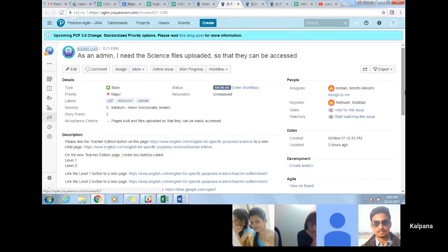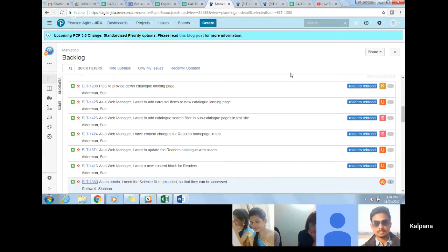Okay, but we are not sure whether we would be able to accommodate this story into the sprint, since we have other stories for readers. Srinidhi has 6 points of velocity for this sprint. She is already occupied with 5 points for the readers user story, 3 more points for the other story, and 3 more points for the form story. And she's planning to take 2 days leave in the sprint, so she'll be able to complete 2 stories. Would that be okay, Sue?